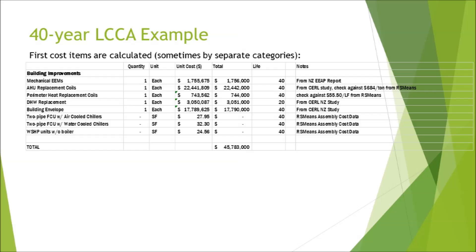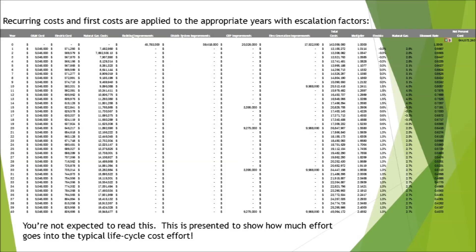All costs — annual and one-time — go into a large spreadsheet with years running from zero to 40. Building improvements are first costs in year zero, and annually recurring costs appear as items come due for replacement in out years. Utility costs, electric costs, natural gas costs, and O&M costs all total up to give a total cost per year as a cash flow. At the end, we roll it up to get a net present cost for each alternative being considered.